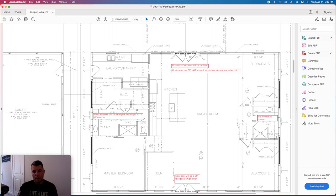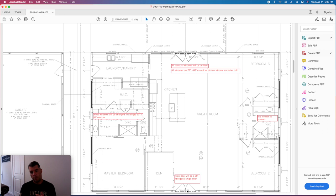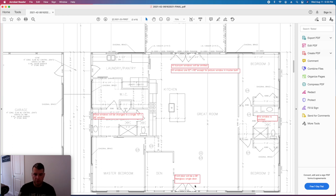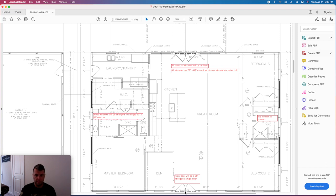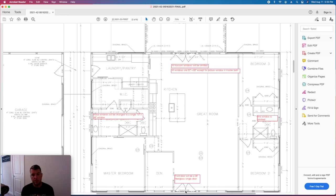Also, for energy and for budget costs, we're going to eliminate the French doors in the front, and we're just going to go with a fiberglass door on the front, one that I can stain. But we're going to do a 36-inch door, so if we're moving stuff in, that helps with that. And it'll still have a nice look to it, and it'll be a little more energy efficient than what this would be. So I'm guessing there we probably saved maybe $1,500 to $2,000 on that door as well.